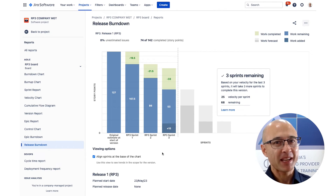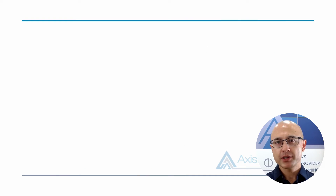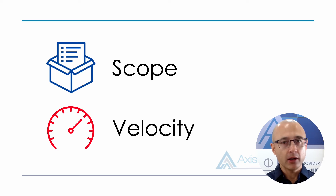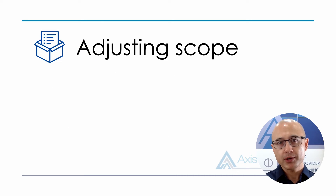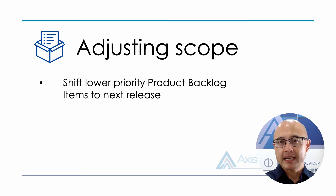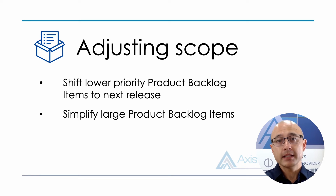Now let's imagine the team is not going to deliver on time — what can you do to get back on track? There are two levers: scope and velocity. As an agile coach I always suggest looking at scope first. By virtue of a prioritized product backlog, the items at the bottom are less valuable, so it might be simple — just shift lower priority items to the next release. You can also look for larger product backlog items — 20, 40, or 100 points — and ask if there's an easier way to deliver those requirements.